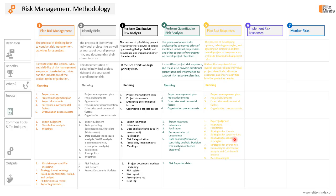Additional tools for plan risk responses include contingent response strategies, data analysis techniques like alternative analysis and cost-benefit analysis, decision analysis techniques, and specifically multi-criteria decision analysis. The outputs of this process will be change requests to update the project management plan, project documents, and performance baselines as per the developed response plans. There will also be updates to project management plan components like schedule, cost, quality resources, procurement, and scope management plan, as well as updates to project documents like the assumption log, risk register, and risk report.